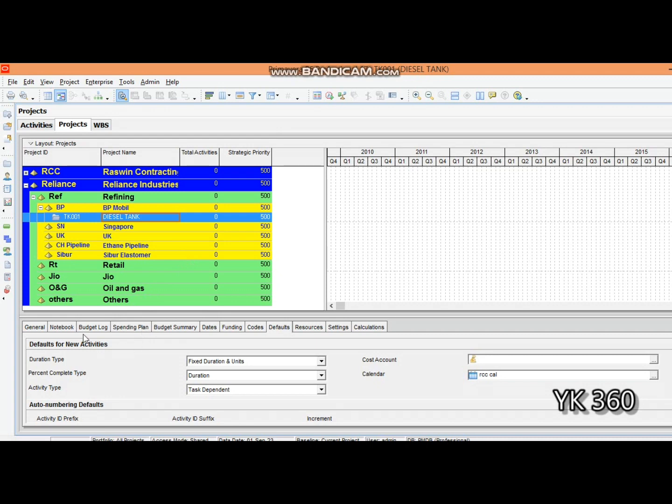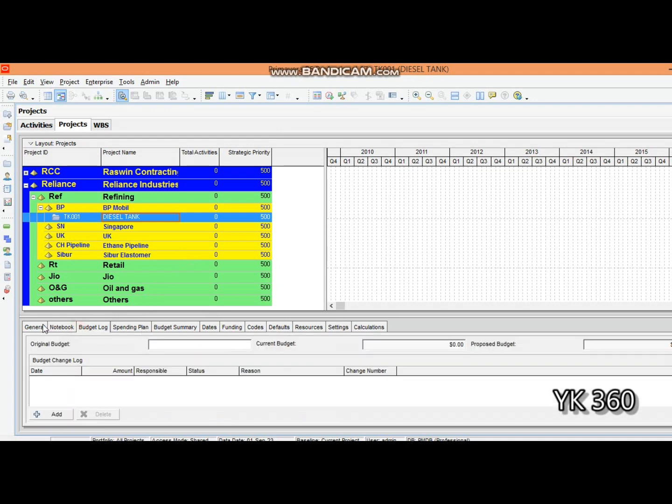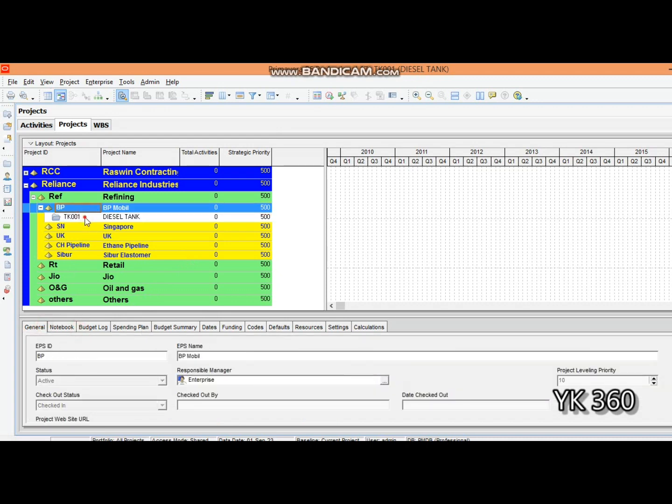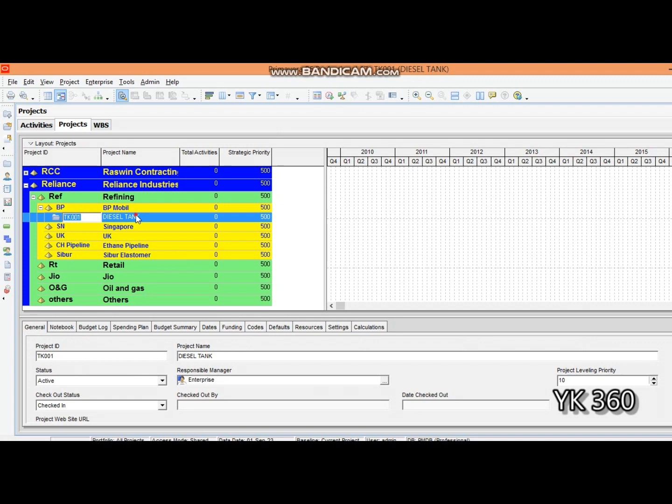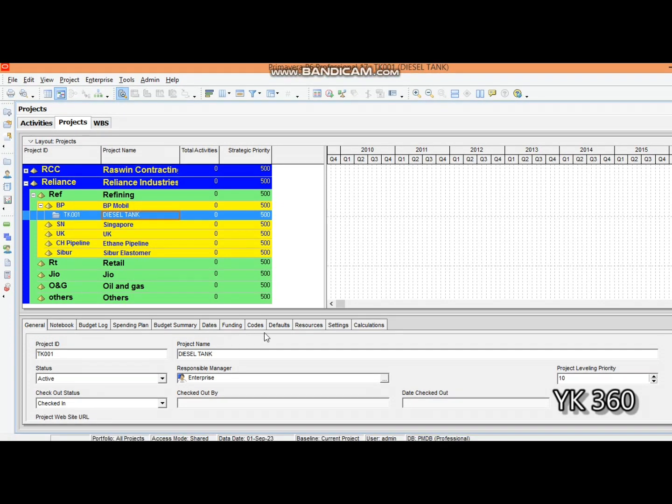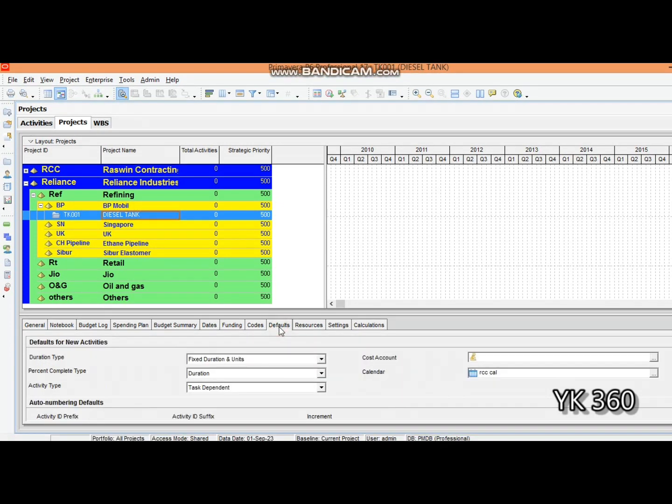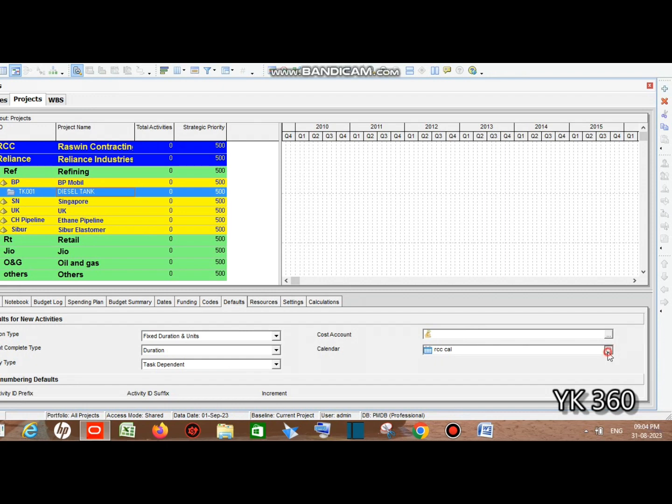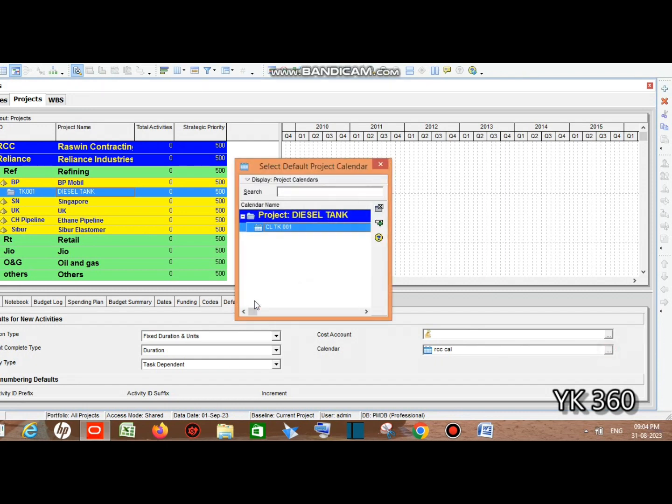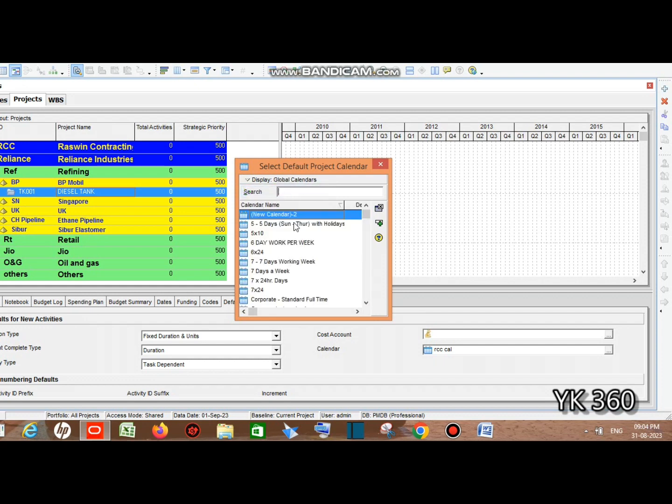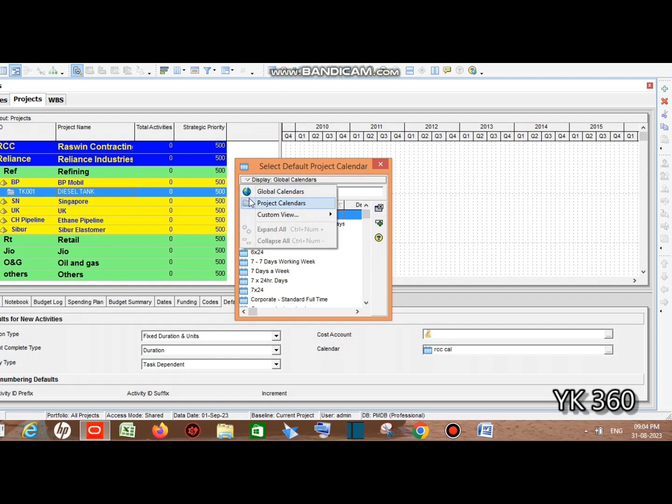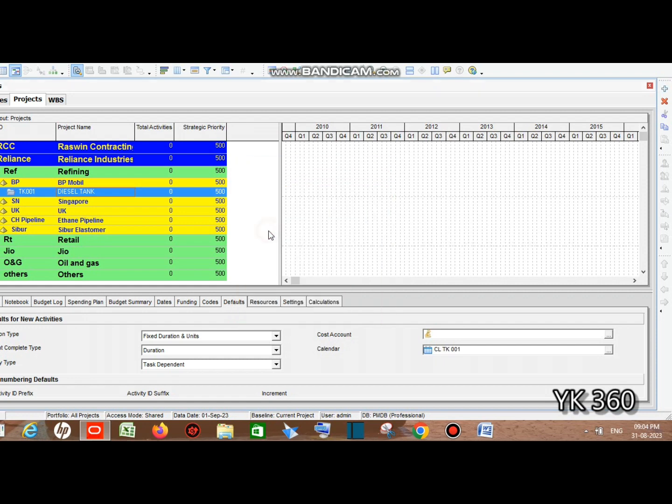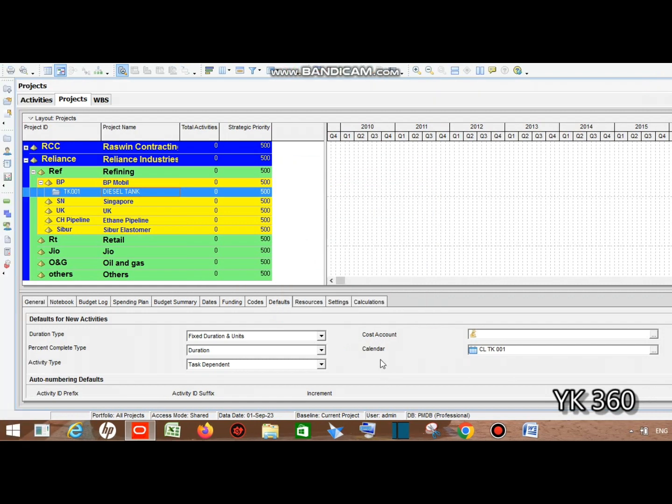Now we need to assign the calendar to our project. Double-click on the project and go to the Defaults tab. There's an option called Calendar - just open it and you can see the created calendar here. If the calendar is not visible, you need to change it here. Since we created the calendar for the project, make sure it's in Project Calendar, not Global Calendars. Click here and we have successfully assigned it.